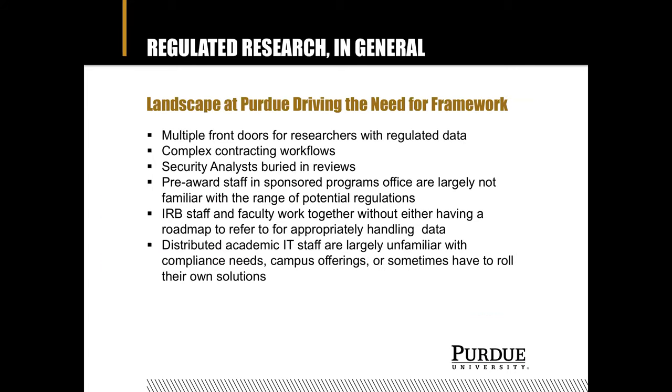So the larger landscape at Purdue made it clear to us that we needed to come up with an overarching framework. There's many front doors for researchers to get into Purdue with regulated data. We'd see contracting workflows in a number of different places and with varying levels of complexity. The security analysts spend an inordinate amount of time doing data use agreement and data security reviews, rather than proactive things. The pre-award staff, the people who are working with researchers to get a grant set up and started and proposed, they're largely not aware of all of the things that they might need to be cognizant of on regulations, or even knowing that there's a cost to some of these solutions that the proposal should include in a budget.